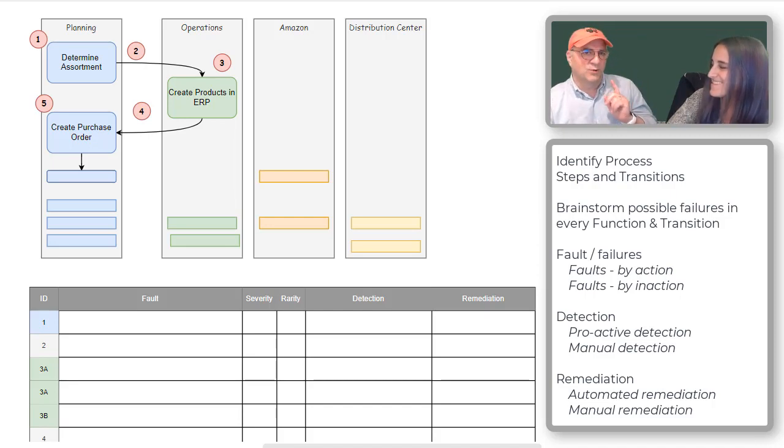Okay, so what could go wrong with the assortment process? When you determine the assortment, what would be a failure mode in that process? A failure mode would be picking a print that has not been approved by the factory. Ooh, that would be bad, right? You get ready to put it up on Amazon, and it turns out they don't actually have it. Absolutely. Being like, oh, I want a Stars and Stripes print, but you haven't gotten it struck off with your factory, which is basically approval. And then you can't actually order that print.